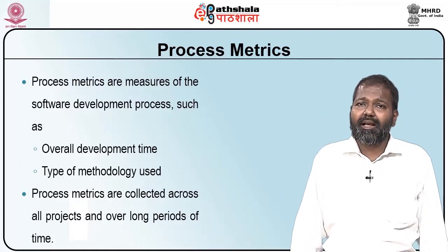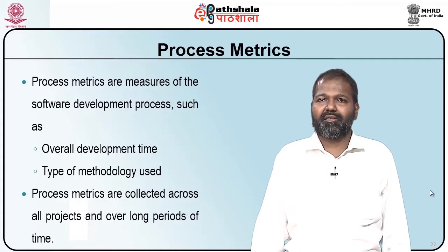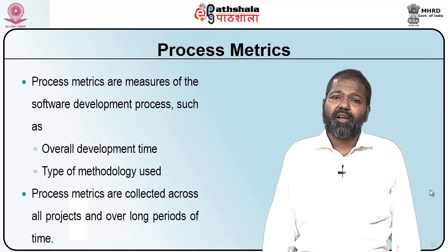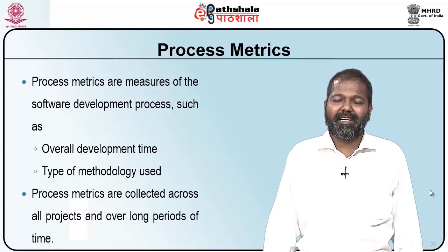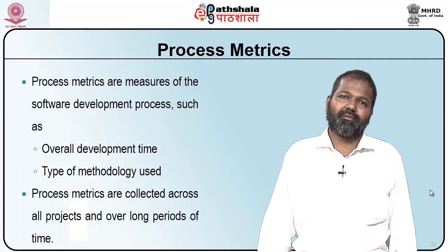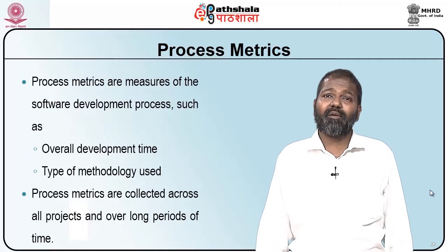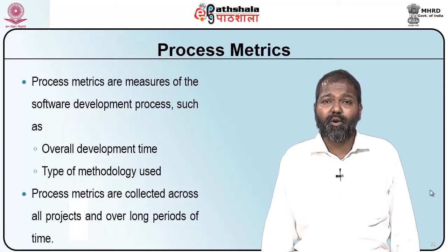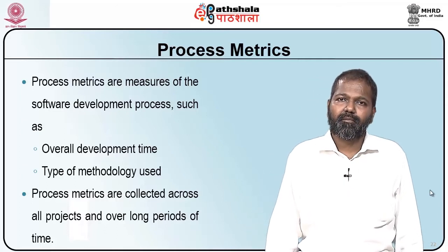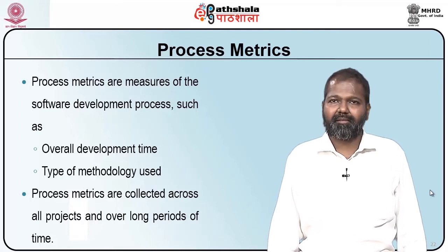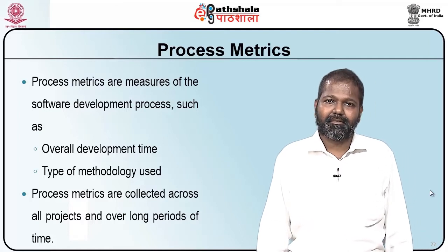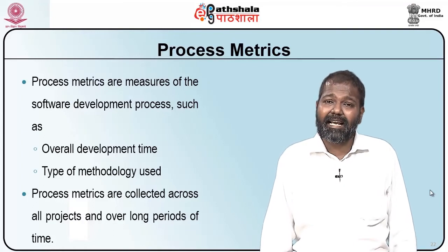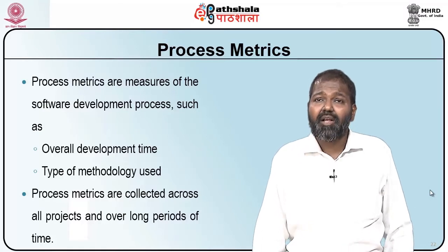And when you are computing your schedule, you fix milestones, which are targets of achievements. You measure whether you have achieved each milestone. If you have not achieved it, you will have to perform a what-if analysis and analyze why you have not achieved it. Probably recalculate the time or try to measure how you can complete the project in time by adding additional resources.